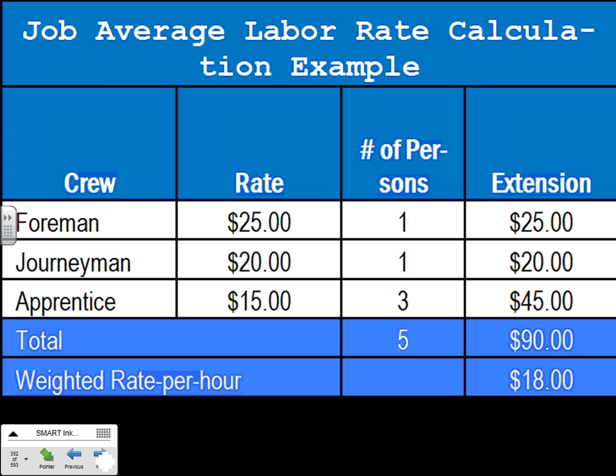Now, if you want to do it in Minnesota, guys, piece of cake. Change this one into $33 foreman. I don't know if you need a foreman, but if you want to put one, that will be part of your system. So 33, and pay each one of those guys $20, and you can find the job average. Any comments, any questions about the job average?